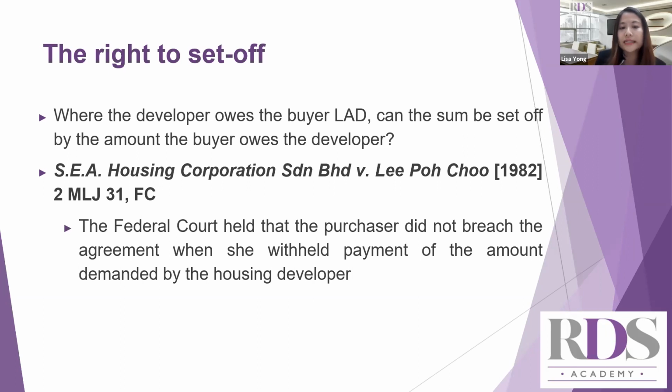The issue in this case is whether the purchaser, in withholding payment of the last installment due to the breach, committed a breach of the agreement. The Federal Court held that the purchaser did not breach the agreement when she withheld payment of the amount demanded by the housing developer.